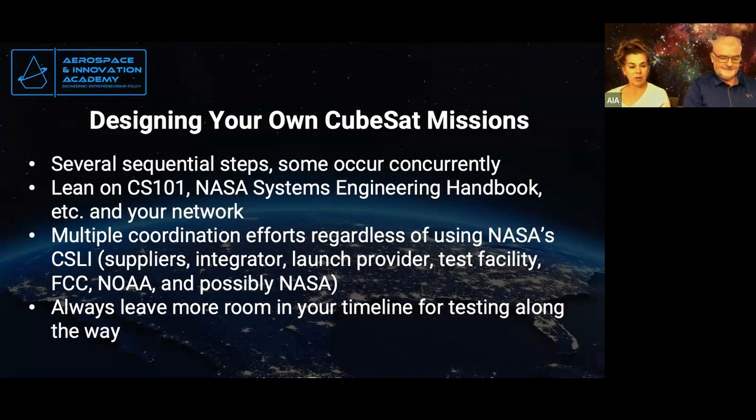I would imagine, when you're dealing with anything governmental like that, there's a lot of red tape that can go along with getting these certifications. Because they do other things besides CubeSats, right? Obviously, with the FCC we're talking about all communications, but this must be a small niche for those. Yes, I'll be speaking about the FCC later, but they control all non-federal government uses of the electromagnetic spectrum. It's very important you get your coordination done properly, or you could be demanifested, meaning you've earned a ride, been assigned to a mission, but you'll be taken off of that mission because you did not have your paperwork done in the right way.